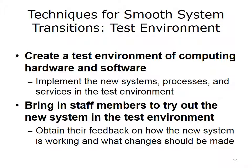Another technique for smooth system transition is to provide a test environment. The test environment for computing hardware and software provides a place to implement the new systems, processes, and services so you can gain confidence about their operation. This is an excellent opportunity to bring in staff members to test the system before they try it in the operational environment. It is especially important to obtain feedback as they work in the test environment on how the new system seems to be working and what changes need to be made. One way to handle this is to insert instrumentation in the test environment to get metrics on system performance, including response time and how users are interacting with the system.